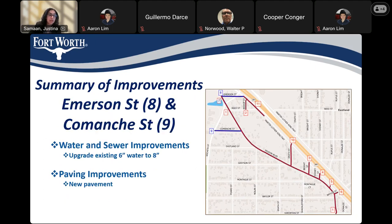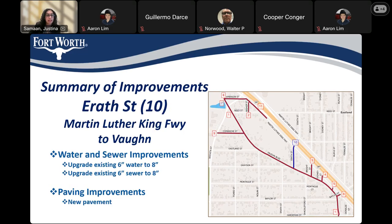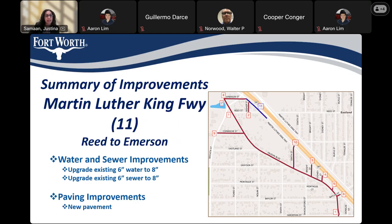Next is Emerson Street and Comanche Street, numbers 8 and 9. We'll be upgrading the existing 6-inch water to 8-inch and installing new pavement. Number 10, Erath Street, from Martin Luther King Freeway to Vaughn, we will be upgrading the existing 6-inch water and sewer to 8-inch and installing new pavement. And last one, Martin Luther King Freeway, number 11,